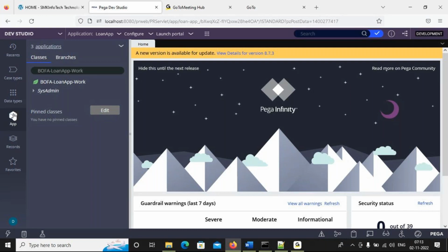So according to maybe each sprint should have maximum 9 to 12, maximum below 15 user stories. Okay, below 15 user stories are there. So if we have 5 members, they will divide for everyone 2 or 3 user stories, all developers.